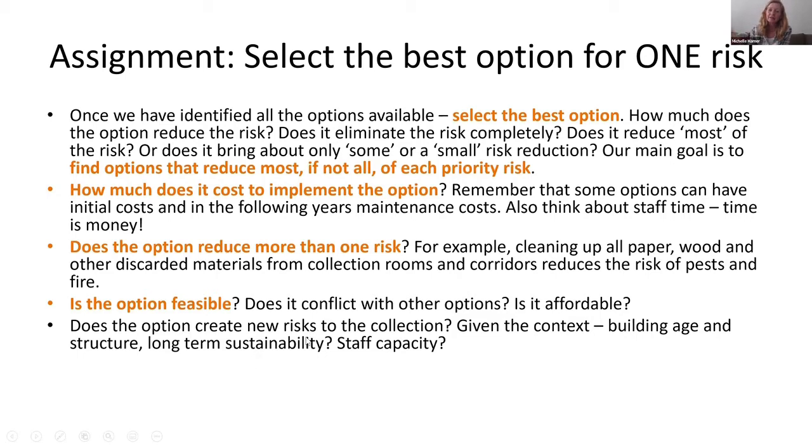And then think about the long-term sustainability and the staff capacity. Sometimes you can come up with the money to buy something and it'll be a good solution, but have you got the capacity to develop the specifications for it, and have your SCM got the capacity to actually procure it through government systems? So you've got to think about capacity, and that can be a challenge.